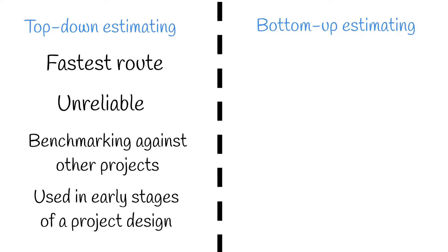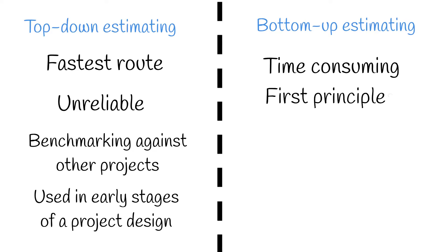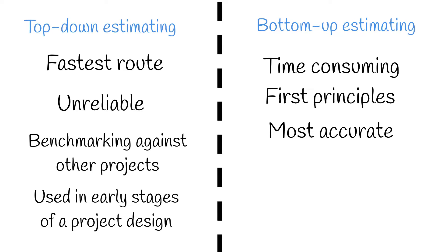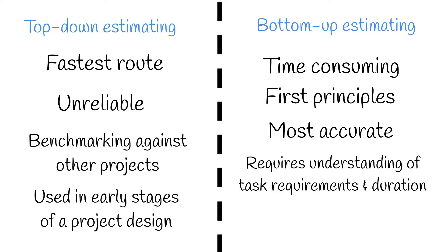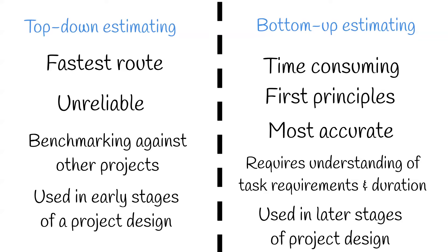Bottom-up estimating is much more time-consuming. It's based on first principles, and provides an accurate cost of a project by understanding the specific task requirements and program duration. A bottom-up approach is used when a detailed design is available, and is usually used for the budget when construction commences.